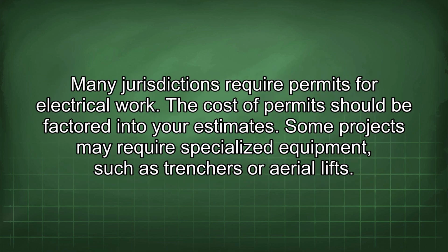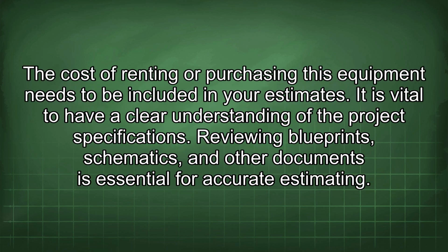Many jurisdictions require permits for electrical work. The cost of permits should be factored into your estimates. Some projects may require specialized equipment, such as trenchers or aerial lifts. The cost of renting or purchasing this equipment needs to be included in your estimates.